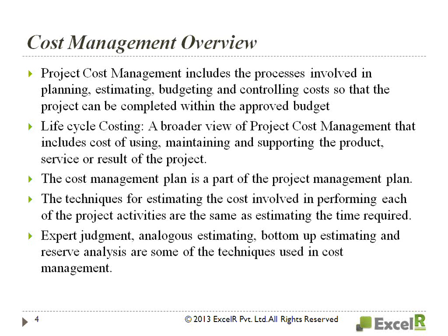Sometimes the initial capital expenditure may be more. Say you developed a different product, and the initial capital expenditure of the product is $100,000. Every month, only $50 is required for the maintenance. So over a 10-year span, 12 months into $50 is $600 for one year, and $600 into 10 years is $6,000.